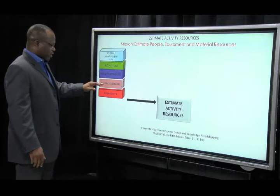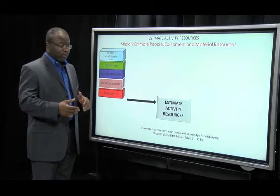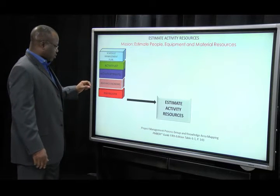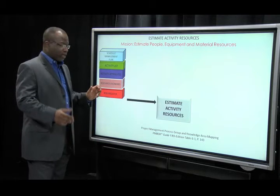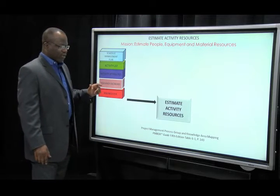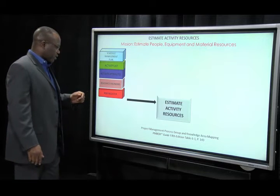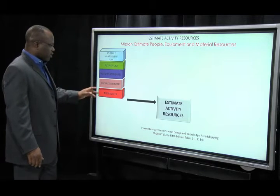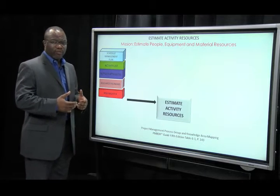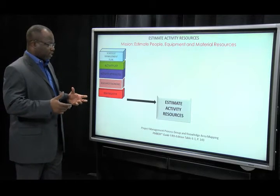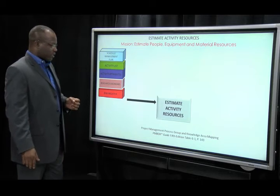Resource calendars and risk register are a bit new. A resource calendar shows you time periods when certain resources are available, and also when they are not available. So if you're thinking of using resource X on a project, get their resource calendar and see if they're available. The risk register is needed here because we could have resource risks, and if we need to build in any contingencies for those resources, we want to have that risk register in hand.